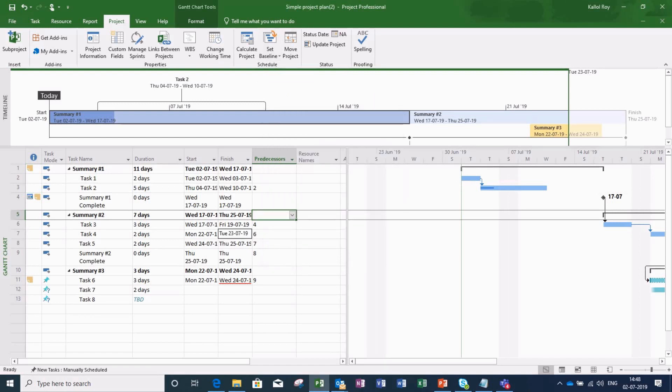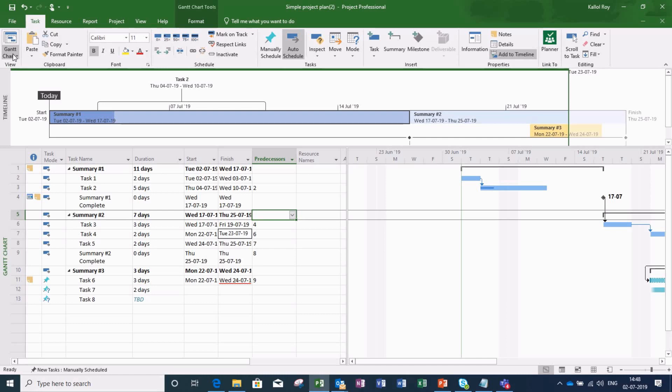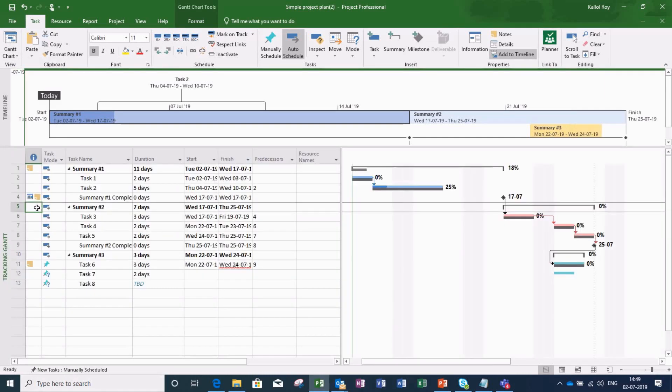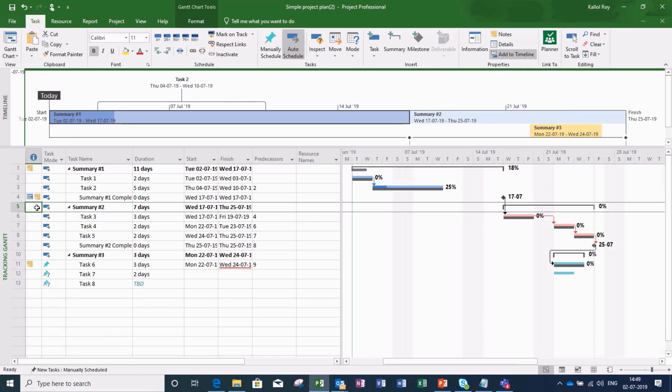Now let us again go to tracking Gantt view from the task menu. What we see now? My initial plan is gone and there is no scope for comparison.